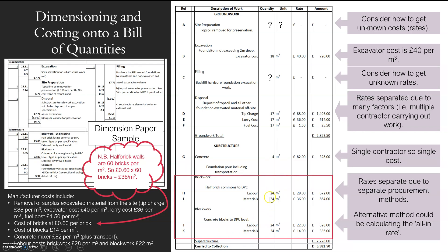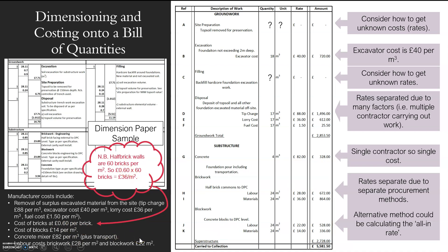I put the numbers in the quantity column and my unit rates. I've put labor and materials separately because I could have a different labor person — say my materials are from one manufacturer and my labor is a contractor. Or again, you could do an all-in rate. Now my cost of bricks is per brick, but I need it to be per meter squared because I've measured brickwork in 24 meters squared. So I need to convert 60p per brick into a cost per meter squared — and that's how you do it.